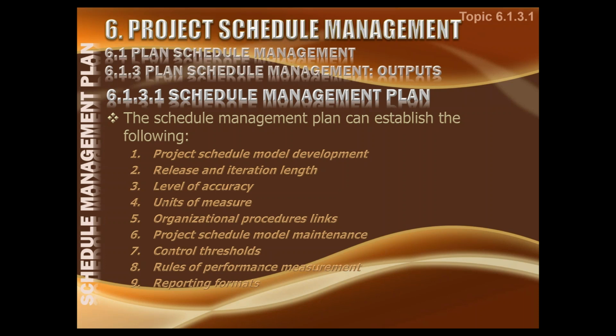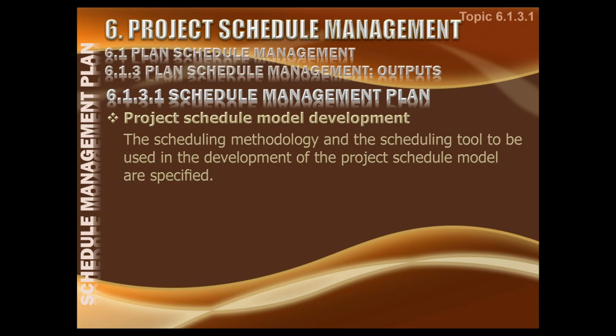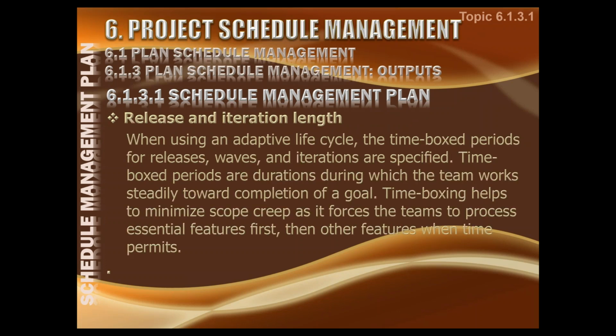This all has to be established in the schedule management plan. As far as the schedule model development is concerned, as I just discussed with you, the scheduling methodology and the scheduling tool to be used in the development of the project schedule model are to be specified with enough reason. Release and iteration planning when using an adaptive life cycle: the time box period, how much it will be.